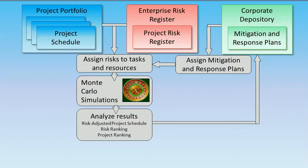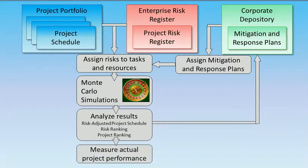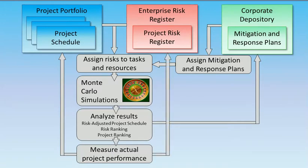This process iterates over the course of the project. During project execution you can monitor your project, which includes the monitoring and control of risks. As your project proceeds, you can update your risk register, mitigation and response plans, and run periodic Monte Carlo analysis to ensure that your project stays on time and on budget.